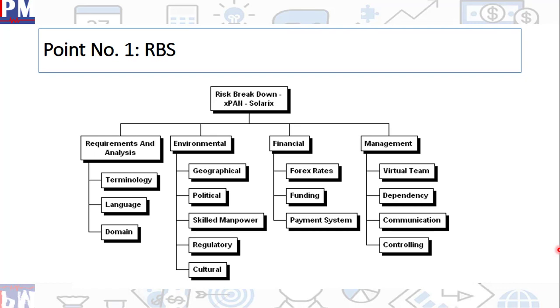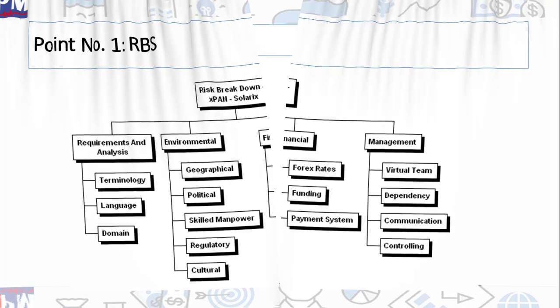RBS is an input to the process called identify risk. Very similar to the way the WBS is taken in identification of all possible activities. In defined activities, you have the WBS, which tells us what are the work packages, and then those work packages are broken down into activities. The same way in risk management, we have the RBS, which tells us the major categories of risk. And later on in identify risk, we break them down into individual risks.